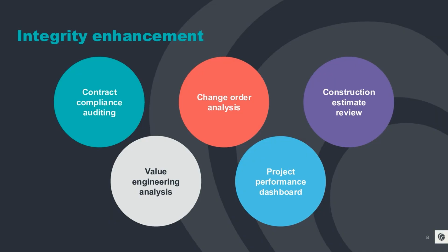On the upfront planning process, Baker Tilly helps some of our clients with things like construction estimate review and value engineering. Are there ways to reduce the project cost by utilizing different kinds of materials, different kinds of construction methods, different kinds of trade and craft professionals to deliver the scope of services in order to bring compliance with plans, specifications, and enhance the budget? If a project can be brought in under budget, the project ROI is improved, which benefits the developer as well as the investors.